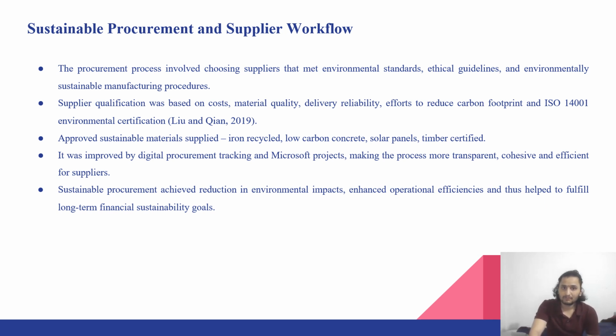In this, the procurement process involves choosing suppliers that meet environmental standards and ethical guidelines and environmentally sustainable manufacturing processes. Supplier qualification was based on cost, material quality, delivery, reliability, efforts, and reduced carbon footprint, and ISO 14001 environmental certificate. In 2019, they approved sustainable material suppliers and recycled, low carbon